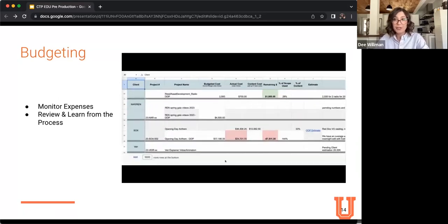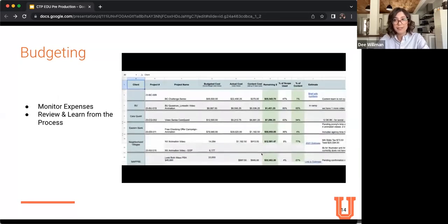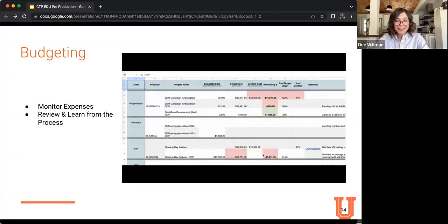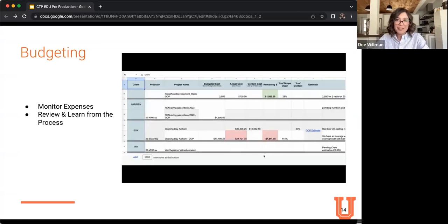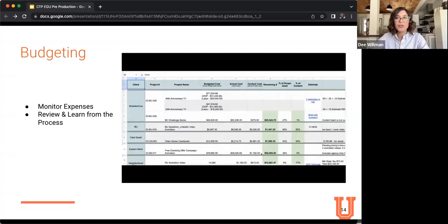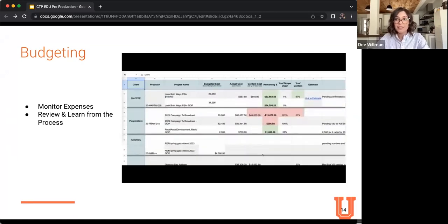You'll maintain your clear communication with your creatives and your account team to stay updated on any cost changes or unforeseen expenses, like changes in music type and licensing, your ad ID cost increases, addition of media plans, such as adding an ad at home that includes your full faces and not just the mouths, so you can go back, renegotiate your rates with your talent and keep your licensing fair and updated.